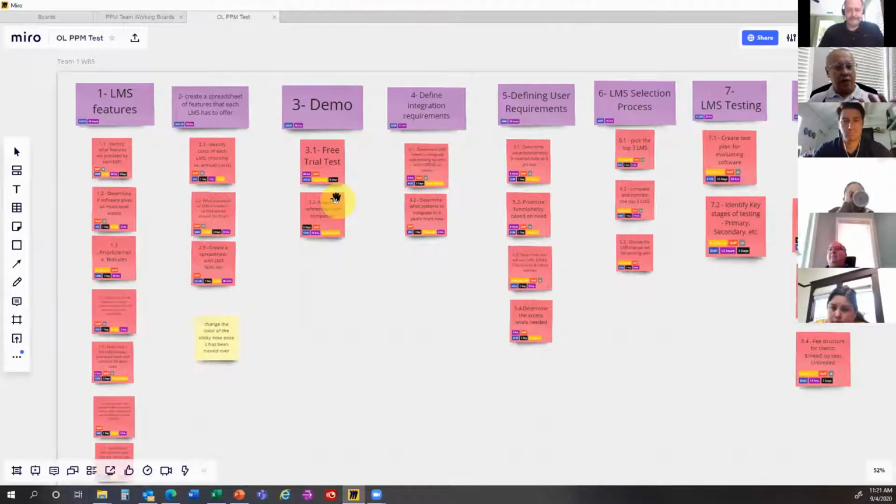If this is what I budget and I get 3 proposals and all of them are way higher than my original budget, then I need to start thinking, are we talking about the right scope? Am I way off on what this should cost? Because it could be on me. On the other hand, you start questioning, help us understand why you have this figure, especially if all of them are high.